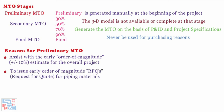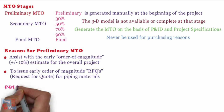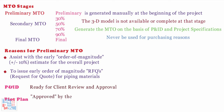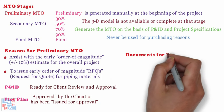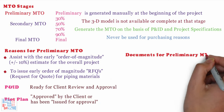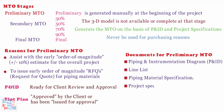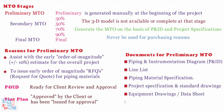The preliminary piping MTO is only done once the P&IDs are ready for client review and approval, and a plot plan has been approved by or issued to the client for approval. The following input documents are required for the initial MTO: piping and instrumentation diagram (P&ID), line list, piping material specification, project specification and standard drawings, equipment drawings and data sheets if available, and instrument hookup.